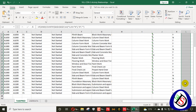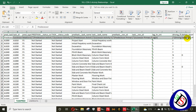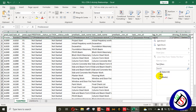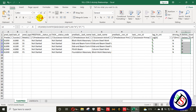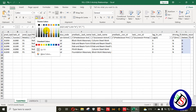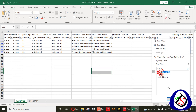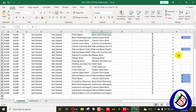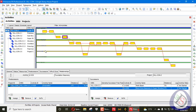For a thousand activities, go here and filter for D's — all the D's will be displayed. I will color those in blue so you can see all the activities marked D are shown in blue. I will save that file. I want to delete all these rows from my schedule, so I save the file.